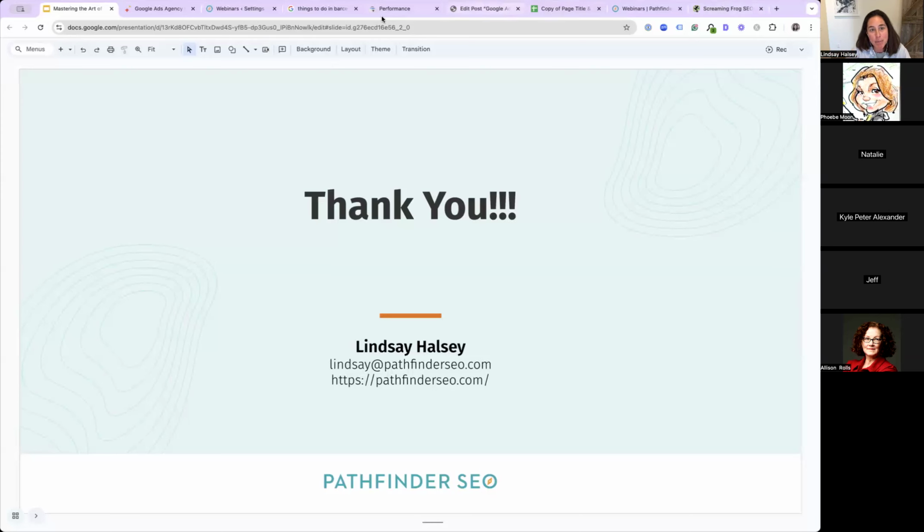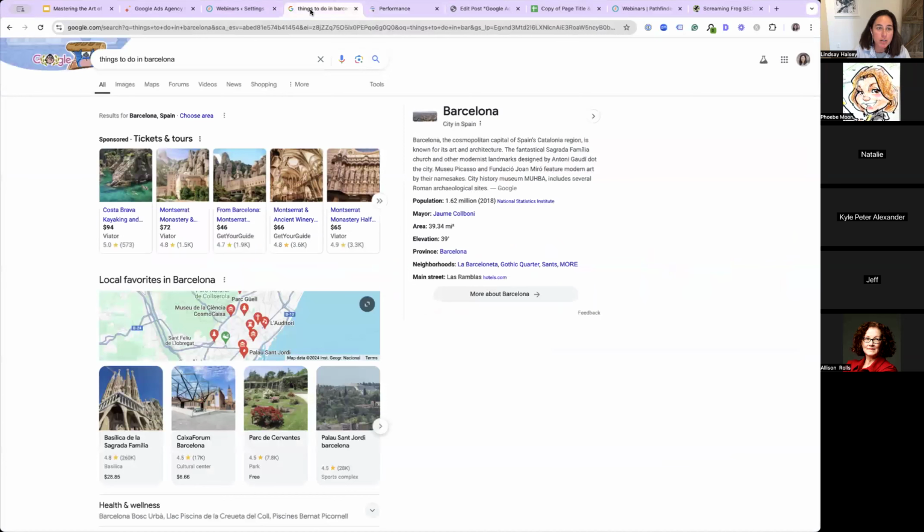If I'm looking in the Search Console at keywords, looking at competitors, writing, editing, et cetera, it could take us about 15, 20 minutes per page title and meta description. If I'm moving fast and skipping a step or two along the way to just shore things up a little bit, we can probably move faster. So just kind of trying to estimate out that project.